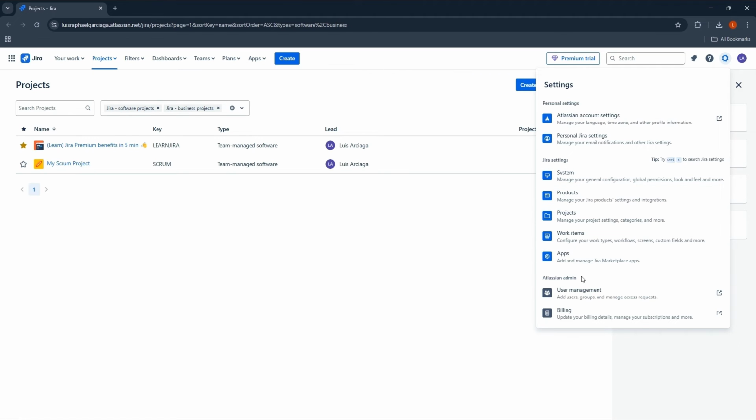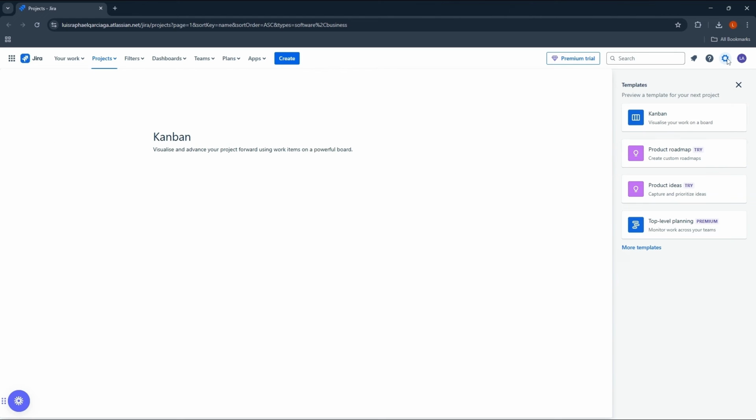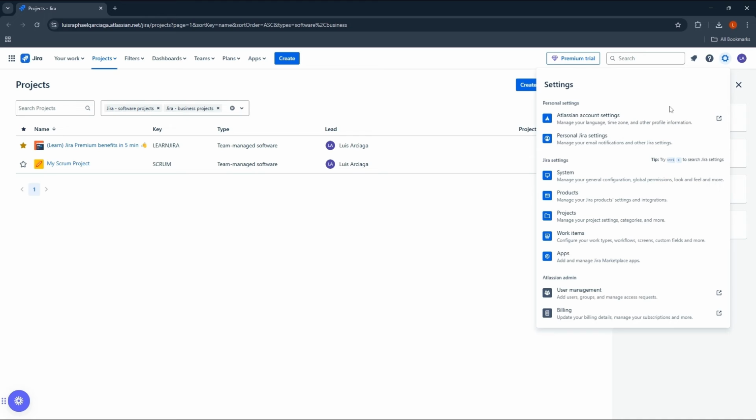2. Assign time to resources. In the team view, you can also assign time to specific team members, ensuring that time tracking is aligned with your team's project assignments. 3. Adjust availability. Set up your team's availability in the settings to account for holidays, vacations, or non-working hours.